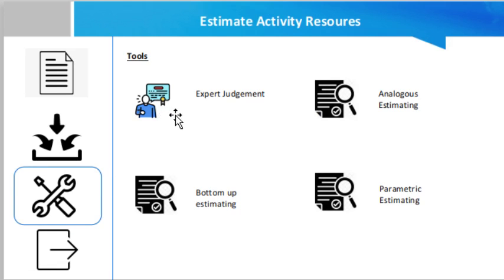The tools used for this process include expert judgment — expertise should be considered from individuals or groups with specialized knowledge or training in team and physical resource planning and estimating. Then bottom-up estimation — team and physical resources are estimated at the activity level and then aggregated to develop the estimate for work packages, control accounts, and summary project level.